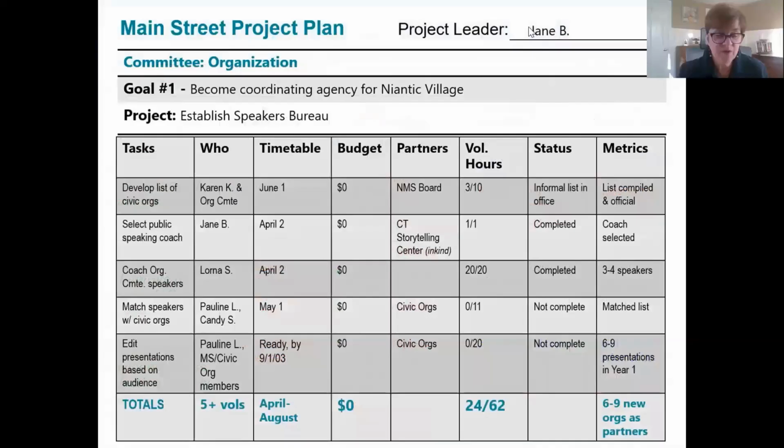If creating a budget completely from scratch feels overwhelming, you're not alone. You can definitely start by creating a detailed project plan to help you think through the budget that is needed to fulfill your project. So you can break the project down into phases, list out what tasks need to happen, and then estimate the cost for each one. Once you have a clear project plan, creating a budget becomes much easier because you can focus on one task at a time instead of the whole budget and all the indirect costs all at once. In the next lesson, we're going to go deeper into project planning, but this is where we can help with our budgeting.